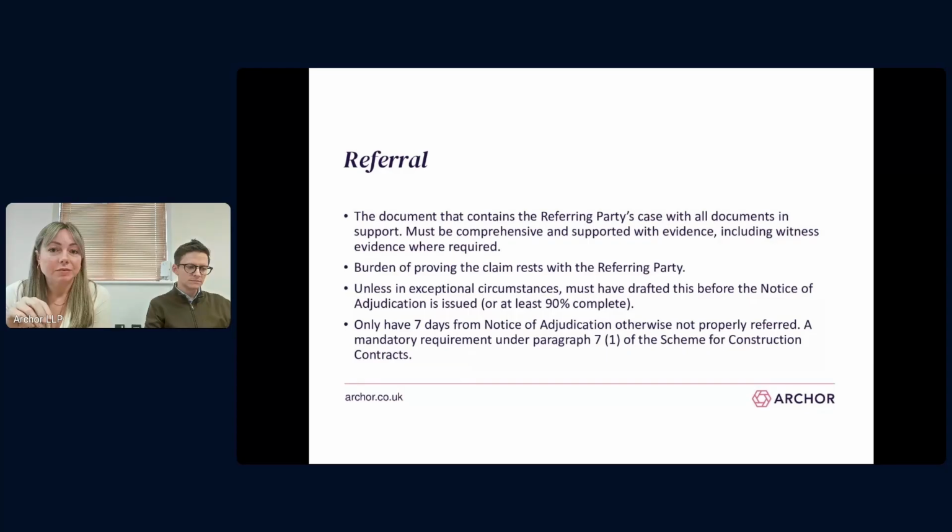The next step is for the referring party to serve the referral notice. I've already said this must be served no later than 7 days after the notice of adjudication, and as we've said, this period can't be extended. As I've said on the slide, the referral needs to set out the referring party's case with all documents in support. It needs to be comprehensive, and they aren't always comprehensive, but it needs to have evidence, which includes witness evidence where you need it, and sometimes expert evidence too, if this is appropriate to the dispute that's been referred.